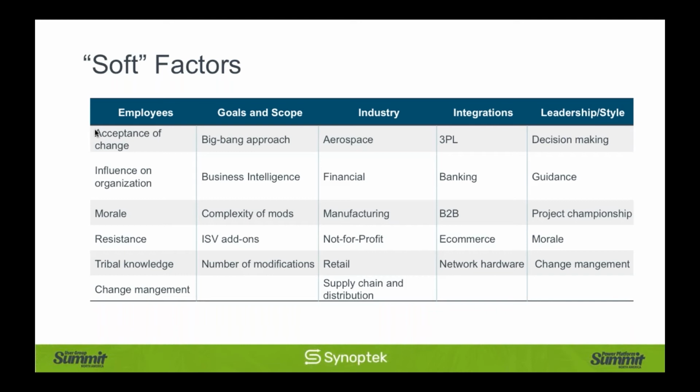If you can implement some of your core processes first and gradually build on additional features, then it actually gives you a bit better chance of success rather than to spend months and months, if not years, working up to having the full 100% perfect solution before you cut over.